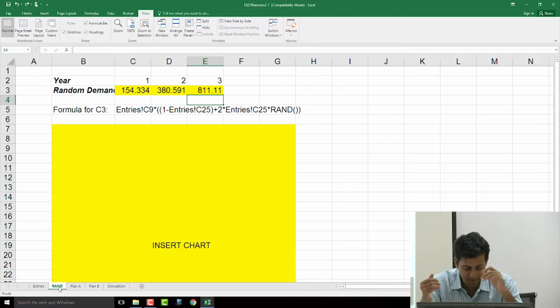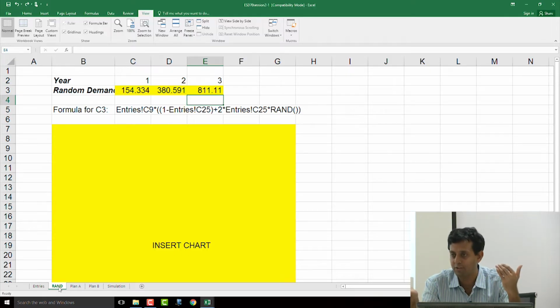So here's where there's a technique that maybe you have come across called Monte Carlo simulation. Monte Carlo simulation says, don't do it once, it makes no sense. Do it 2000 times or some large number, 1000 times, 5000 times, whatever, and then average out those runs, and that will give you a measure of the expected difference in net present value.